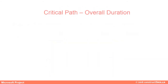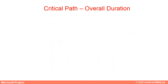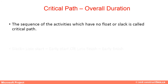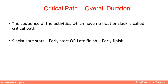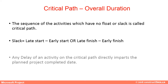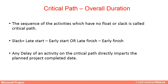The critical path drives the overall duration of the project. The sequence of activities which have no float or slack is called the critical path. It represents the shortest possible time to complete the project. Any delay of an activity on the critical path directly impacts the planned project completion date.